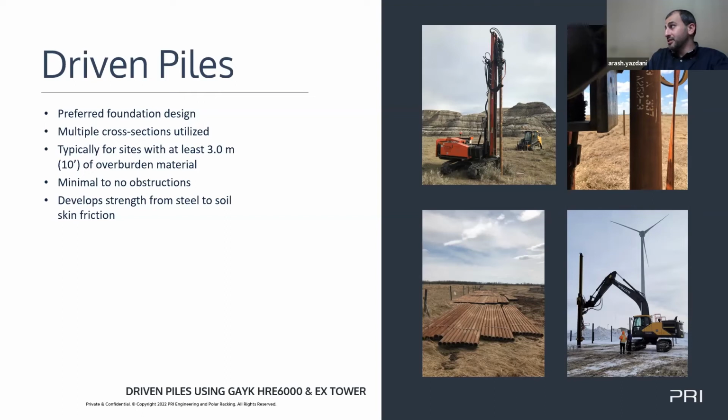Now, when we're talking about round pipe versus I-beam or H-pile, I'm a big fan of the round pipe, just because it's a lot easier to lay out. You can roll it off the skids of your forks of your skid steer. The install, there's no extra access. With an I-beam, you have to line up your flanges. They have to be laser beam straight across. But with a round pipe, if you hit a rock and it twists and skews, it's okay because it's round. You don't have to have it that perfect flat string line across. So there are a lot of benefits to round pipe.